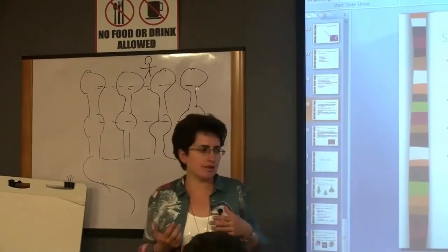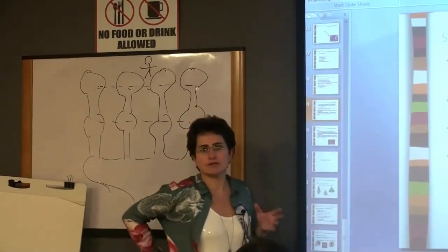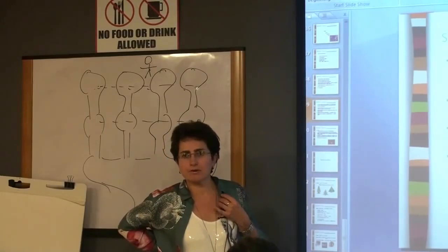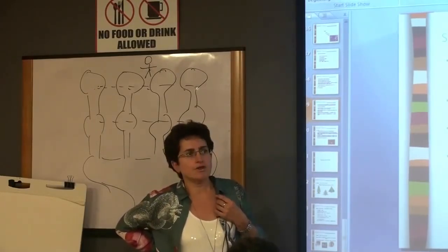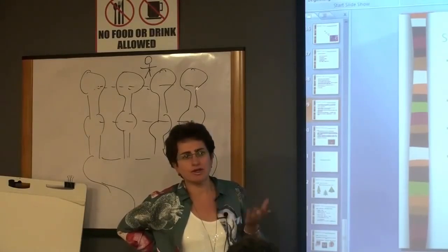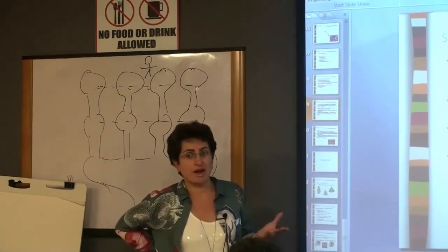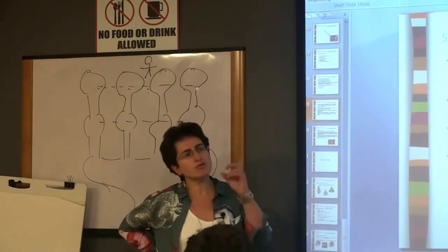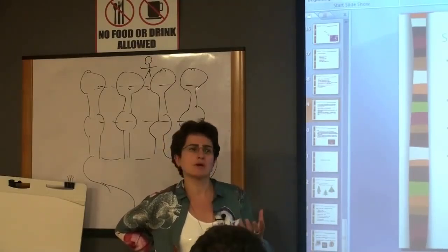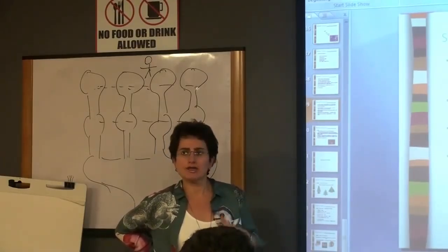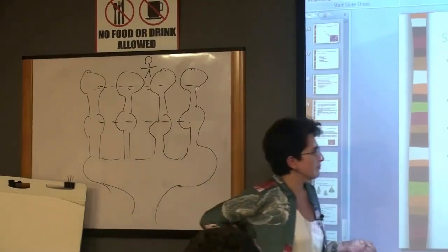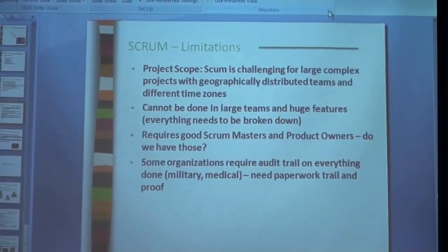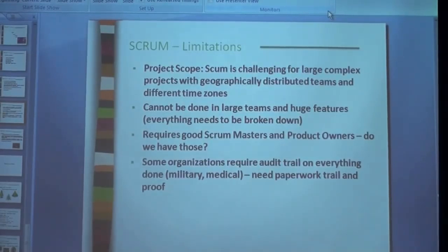In our company, we are moving in the agile development direction. But we have, for example, products where the development team is 200 people and the test team is like 150 people. So it is not always easy. You cannot have 11 Scrum teams, right? Or even more, like 20-something Scrum teams. It just doesn't work. You spend too much time coordinating. So there are some projects where, by the project's nature, you cannot do agile and you have to follow the traditional development methodology.